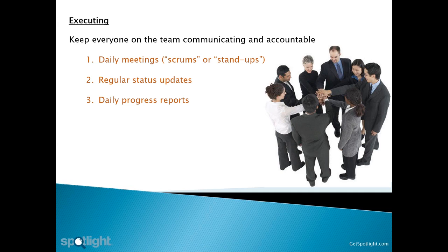Now that you got wireframes and use cases, let's go ahead and set up what's called sprints, goals, and tasks. A sprint in software development really is just a logical time frame. For instance, a 1-week time frame, a 2-week time frame, where we decide that we're going to go ahead and do the following tasks within the time frame.